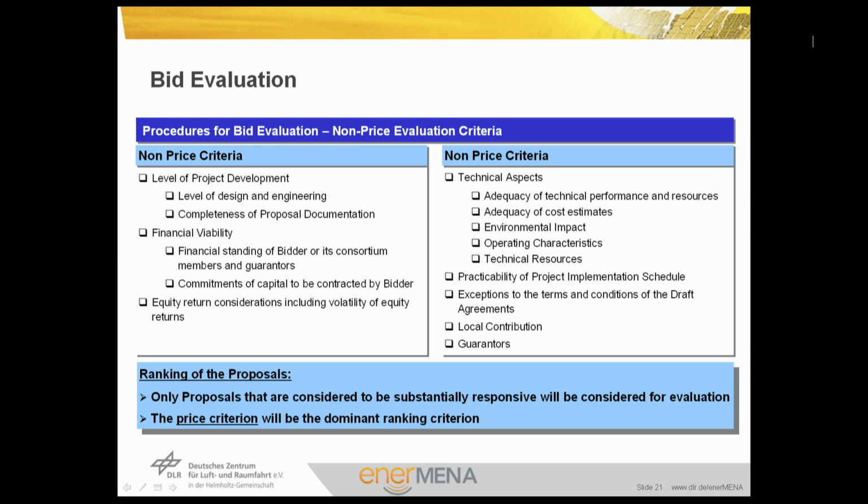For the ranking of the proposals, only proposals that are considered to be substantially responsive will be considered for evaluation, i.e., they meet the requirements of the tender documents. Normally, the price criterion is the driving factor in the ranking of proposals.